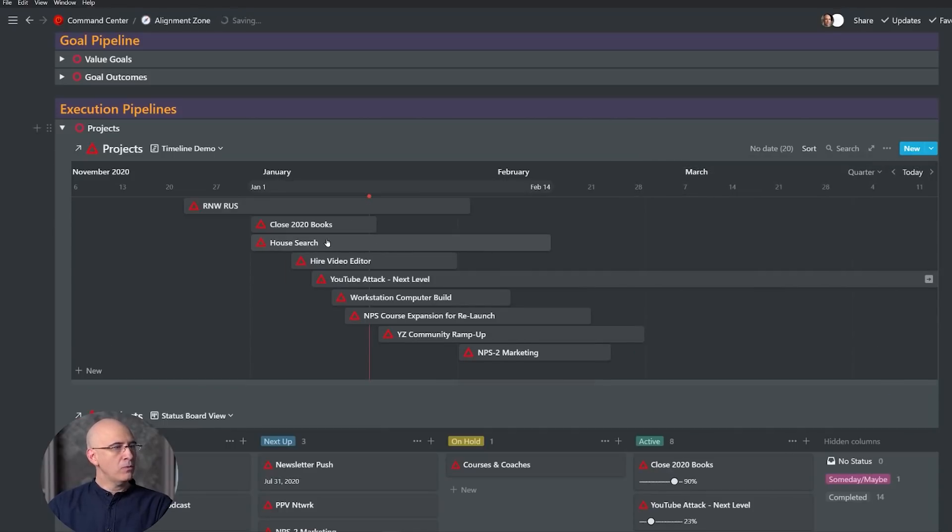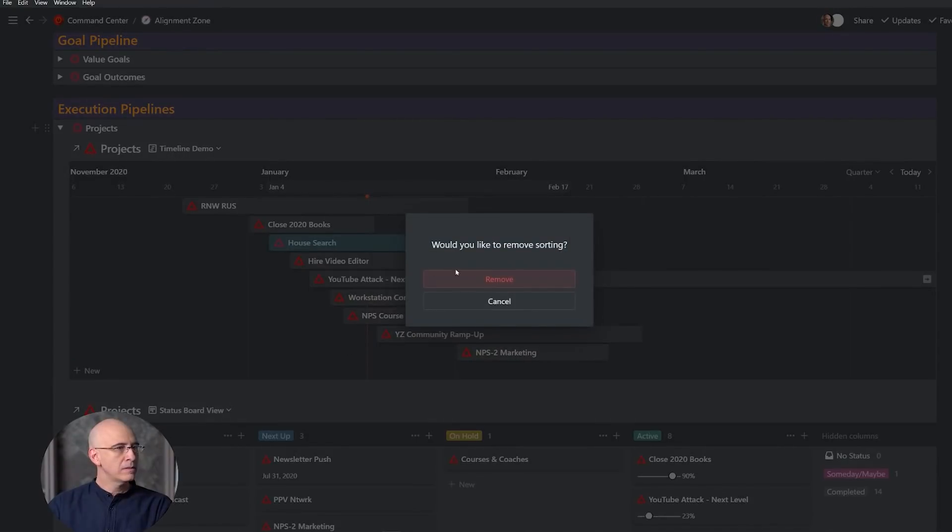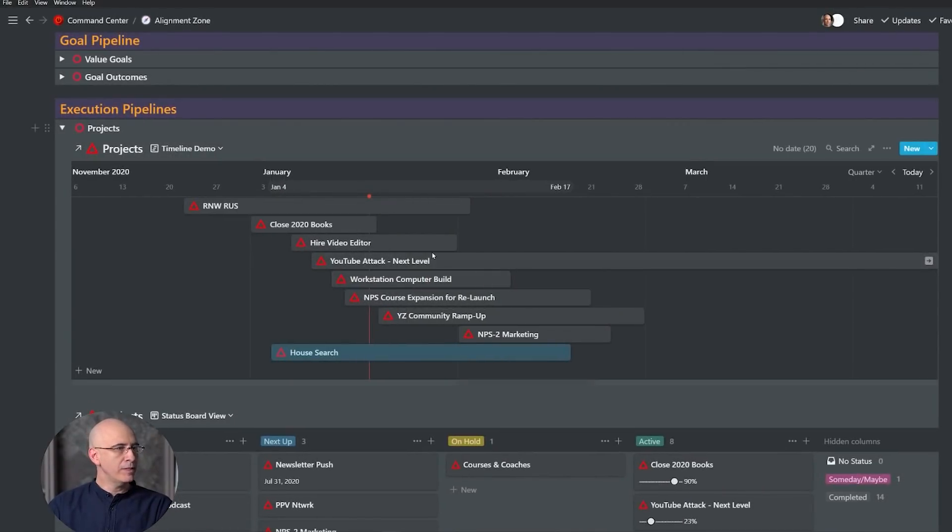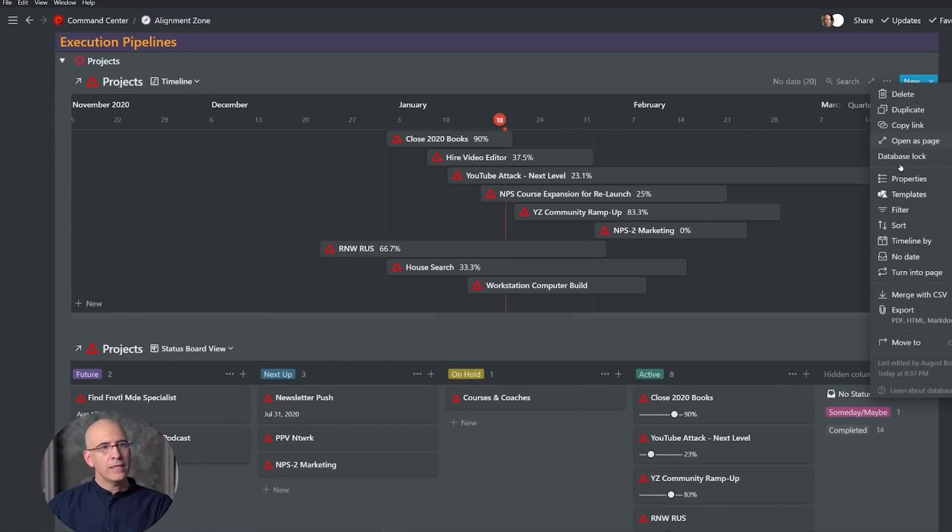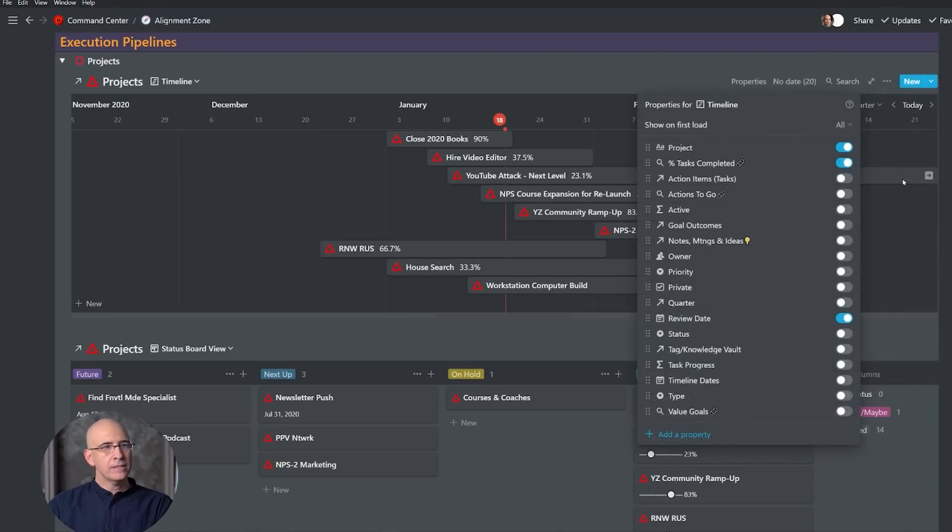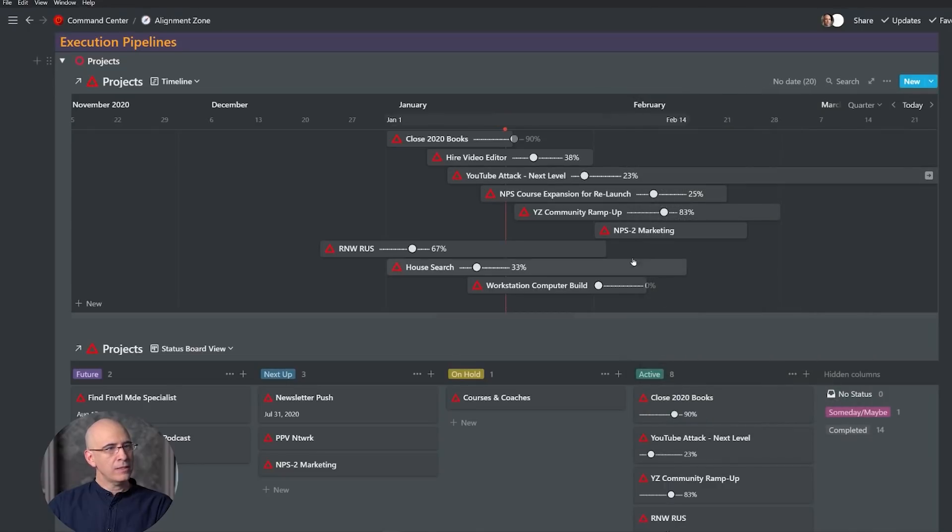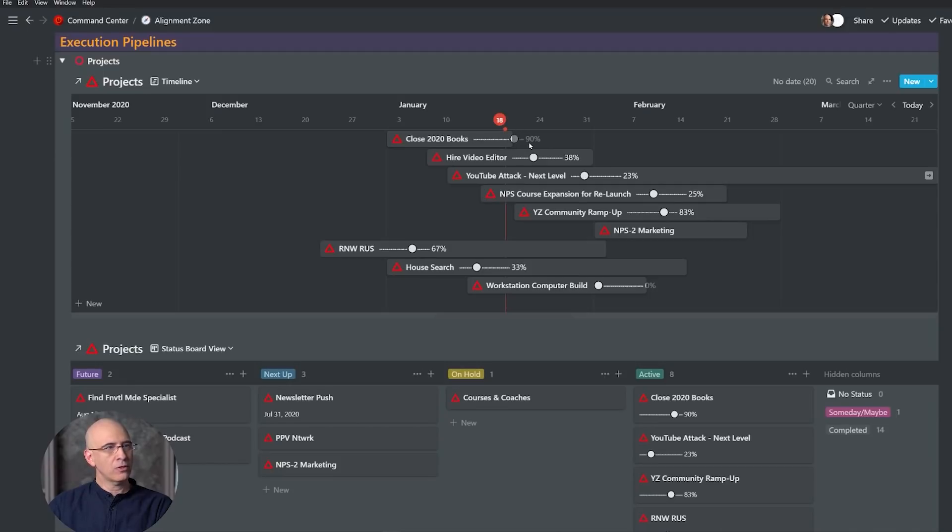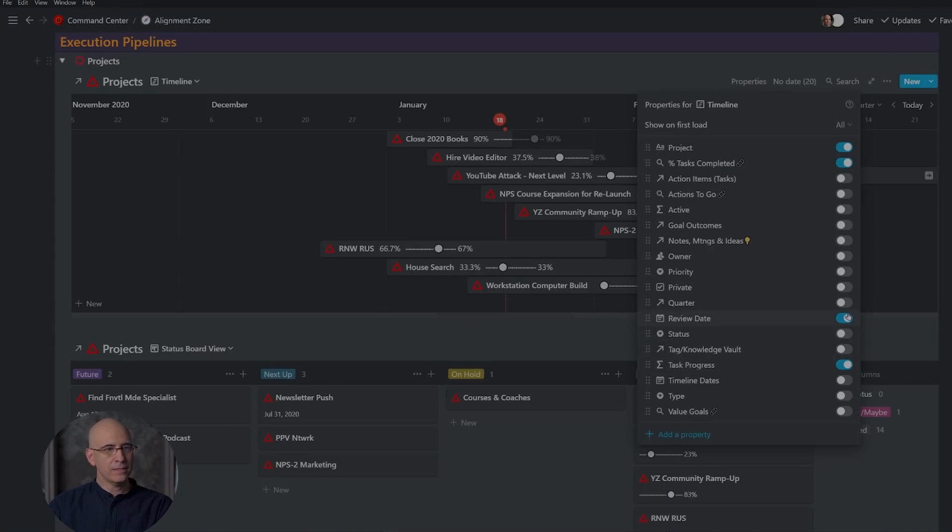Now it did jumble them, it didn't come in with my nice custom arrangement. So we could add a sort. We could sort by the timeline date to stack them all properly that way. And if you just wanted to have a work one, then you can add a filter—Type is Business and you got the business stack. If you want to manually reorganize any of them, you can restack them. Then finally, in Properties, you can choose what you want to make visible. I've made it so my percentage task completed is visible. I try to keep it compact and just use the percentage in this instance.